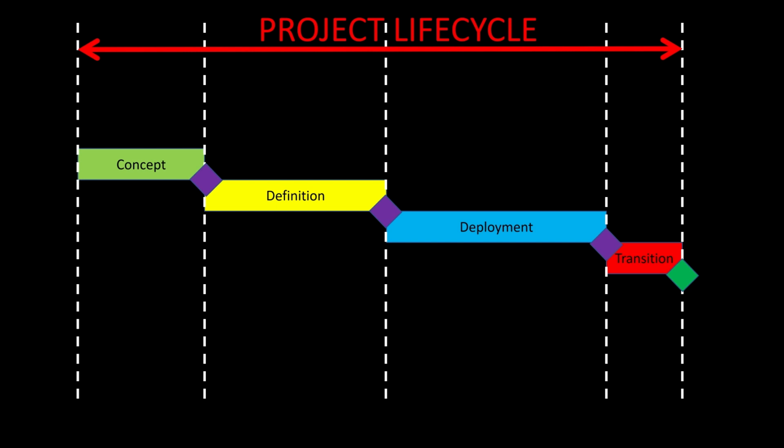And during this deployment phase, we may well have our stage reviews. And again, there are as many or as few as the project manager feels is necessary. They can be once a week, they could be once a month, they could be seemingly random times as defined by the project manager. There's no strict rules around this at all. The more experience you get as a project manager, the better you get at putting in stage reviews. If in doubt, put in more than you need. You can always choose to skip one if you find that it's unnecessary. Better to have too many than too few.